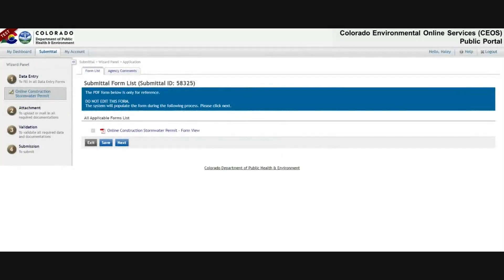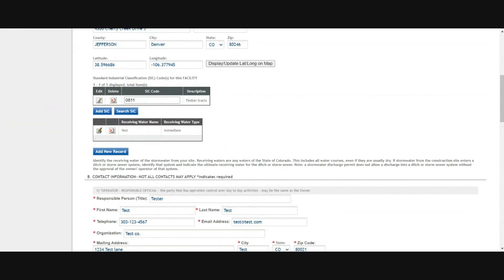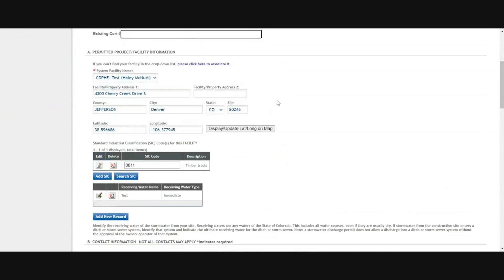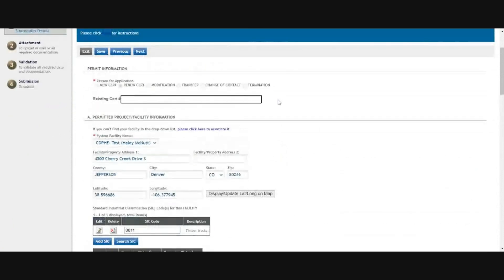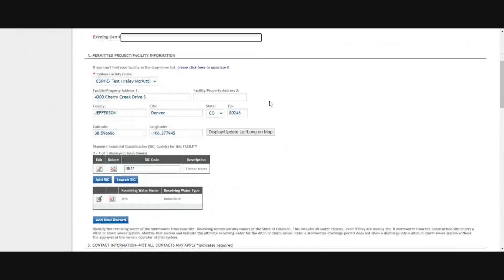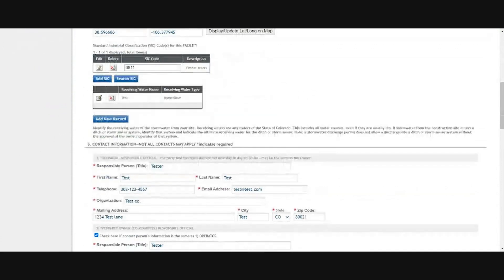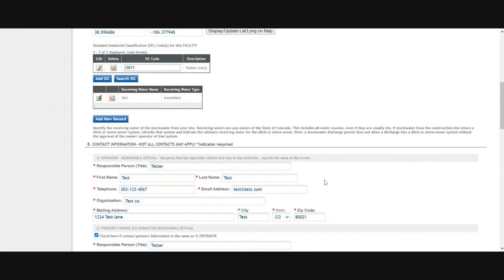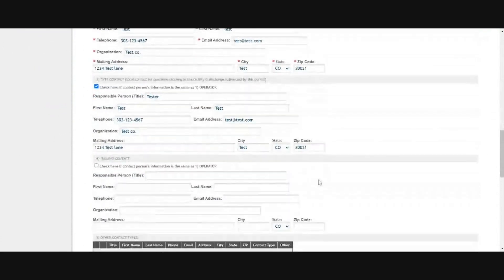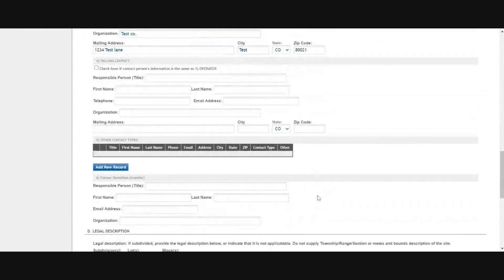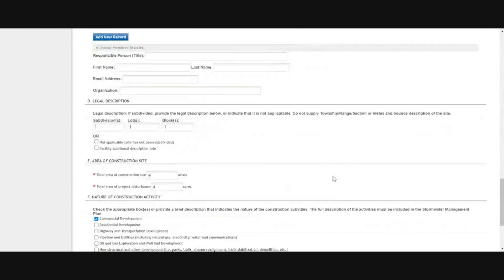This will launch the renewal application for you. Click next. It should autofill if you applied for your permit within COS originally. If your permit predated COS, you'll have to enter the information. Treat this like a new permit application, meaning if you want to update any of the contacts, acreage, dates, or anything, all of those fields are editable to you.